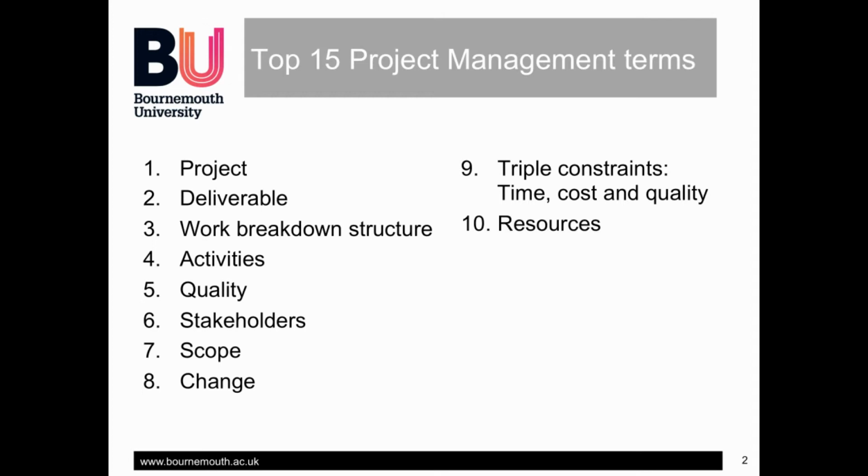We mentioned resources just now. Resources refer to people, equipment, commodities, and also money that is involved in the project. When you're putting together the budget, the estimate for the cost of the project in terms of its resources will comprise the budget. As people work on the project and you buy supplies, book bands, etc., you'll incur actual cost. Actual cost are the real amounts of time expended or money spent. Comparing the actual cost against the budget is a good way for you to be able to assess how the project is progressing and to alert you to possible changes that are needed.